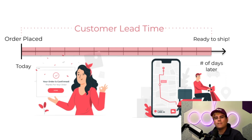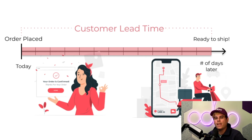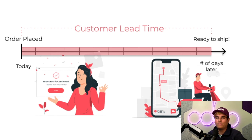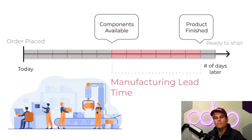Now there are lots of different types of lead times, including customer lead times — the number of days between when the product is ordered and when it's left the warehouse. Whenever we're talking about customer lead time, we're referring to the delivery lead time. And next we have manufacturing lead time, or the number of days it actually takes us to build a product.